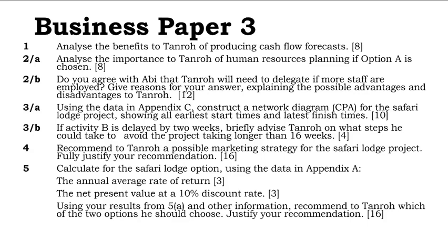Why? Because this activity B is falling on the critical path. To avoid the delay of 1 week, Conroe will have to utilize float times by reducing 1 week time of subsequent critical activities.